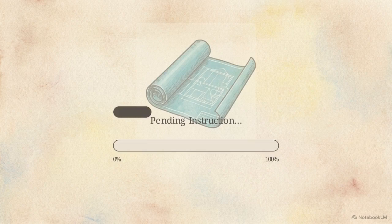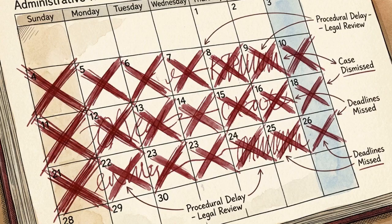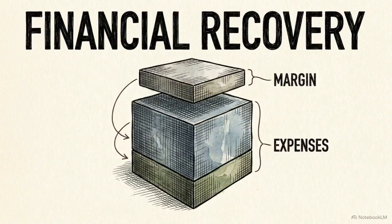You can also face significant delays if the engineer fails to issue critical design drawings or instructions on time. This on-screen calculation highlights your entitlement under Subclause 1.9, Delayed Drawings or Instructions. If the engineer's delay holds up your work, this clause grants you an extension of time, your resulting costs plus a reasonable profit, defined by the guidance as 5%.